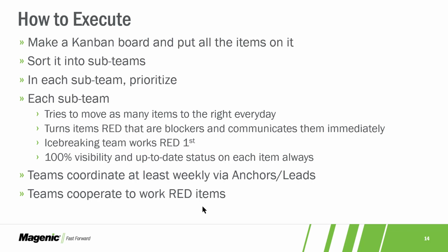And so sprints, traditional agile, are generally not appropriate for migration and modernization programs. In fact, Kanban is. And so we take our backlog and we break it up by which sub-team or sub-teams get it. And in almost all cases, that is a serial affair. That is to say, DevOps may get it first, and then the developers attempt to provision to it, and then the testers test it, and the business says, yea, verily, this is how it is.